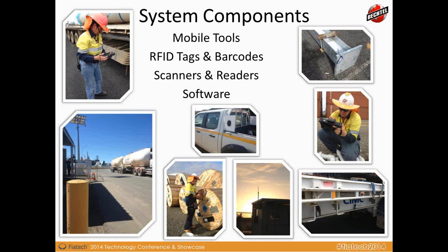So just to give you some stats on where we are, the information that we have in the Jovix system today tells us that we've got about 6.3 million tag reads, which is a big number in and of itself. But we shouldn't think about that just as the reading of a tag, but really the movement of material. The tag reads and the material movements are obviously not the same number. Rather than just think about tag reads, we really have to think about the impact from a material movement perspective. So currently there's about 1.2 million tag movements, which reflects the movement of material that we've had in and out of the locations that you saw.